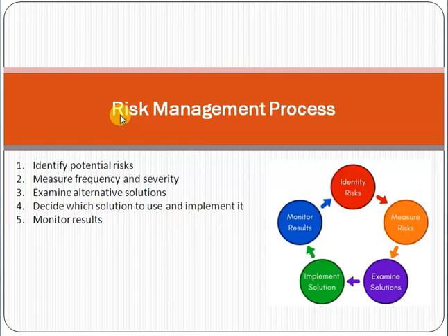Let's assume as a project manager you have been assigned. Now, how will you manage the risk? Manage means how will you identify, how will you manage? First of all, you must identify the potential risk. Potential risk means that first of all you have to drill down the scope. You have to break down the scope into little pieces and then see what actually you have to deliver.